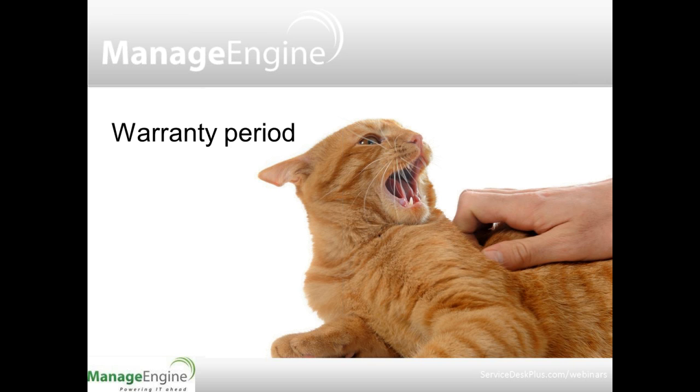They still have the option to run away. And there's also the reverse problem in some organizations where the warranty period never ends. I'm sure you're probably familiar with scenarios of this, where the project, or assorted people from the project, are still supporting the system months or years after it's gone live. And the transition at the end of the warranty period doesn't happen properly.